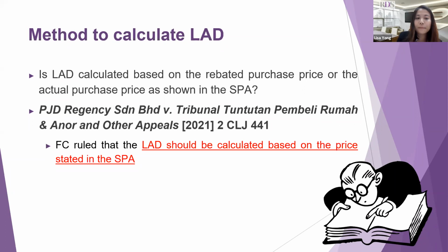The concept behind LAD is aimed to compensate purchasers for the developer's failure to comply with the timeline set by statute. Therefore, any rebate on the purchase price granted by the developer to the purchaser is to be disregarded from the calculation of the LAD.